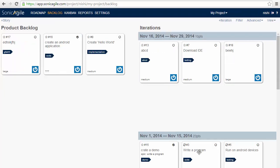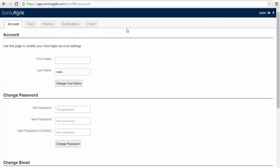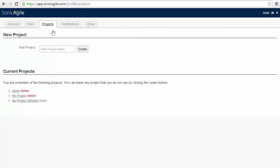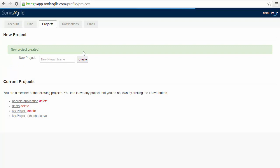After signing into the account, you will be redirected to your SonicAgile dashboard. To start a new project, you need to go to this menu and then go to project and add a new project. For example, if I will start with a new Android application project, then I need to click on create button. This is how my new project is created.